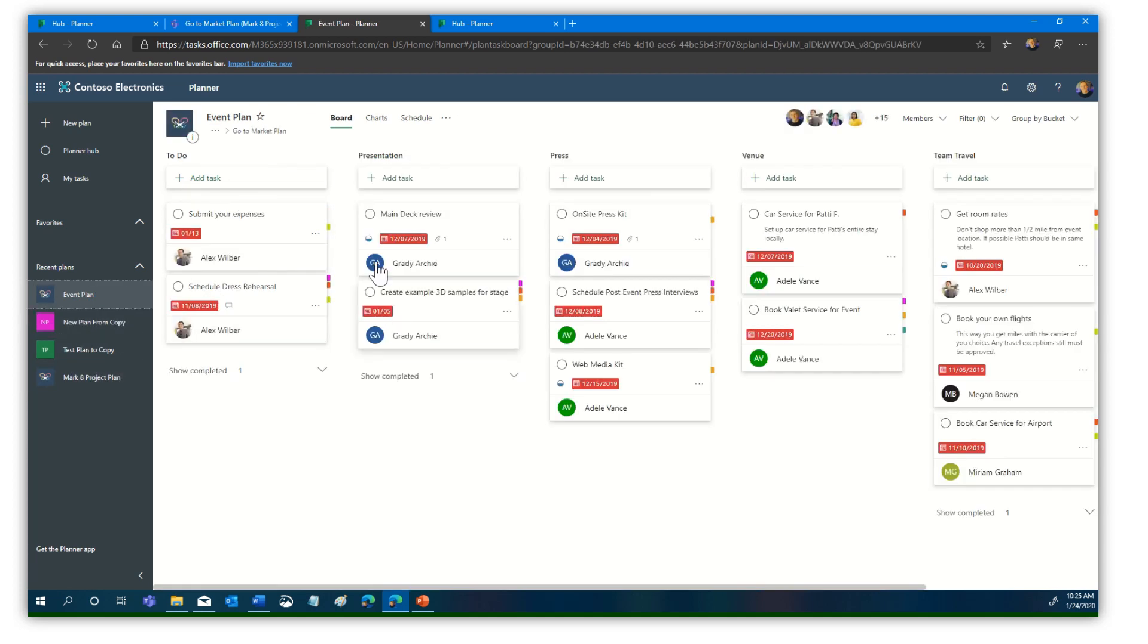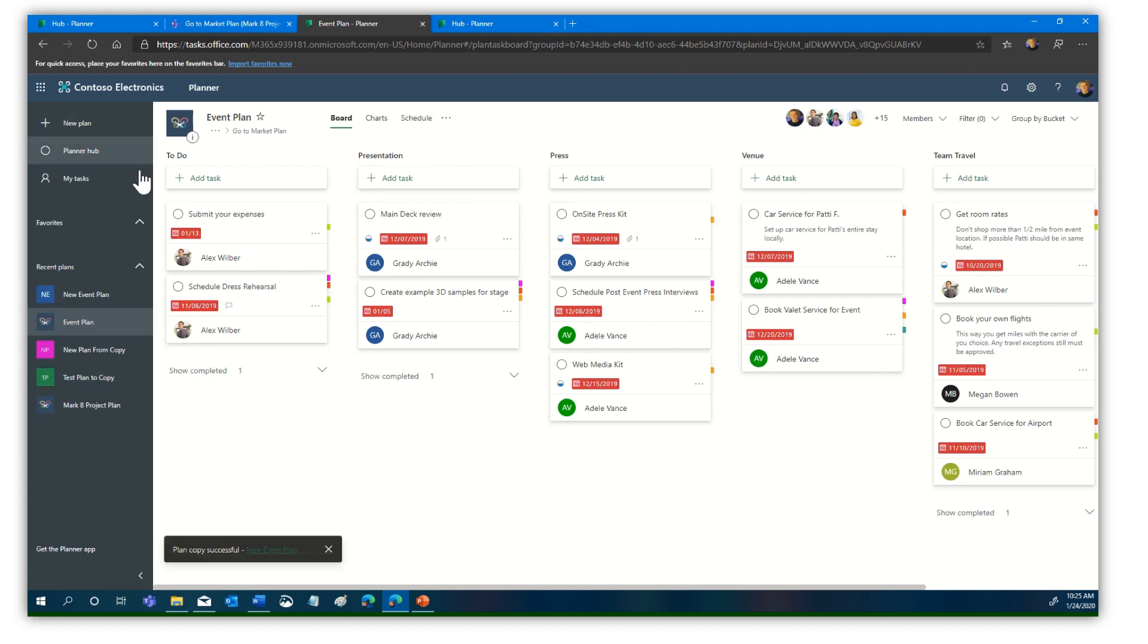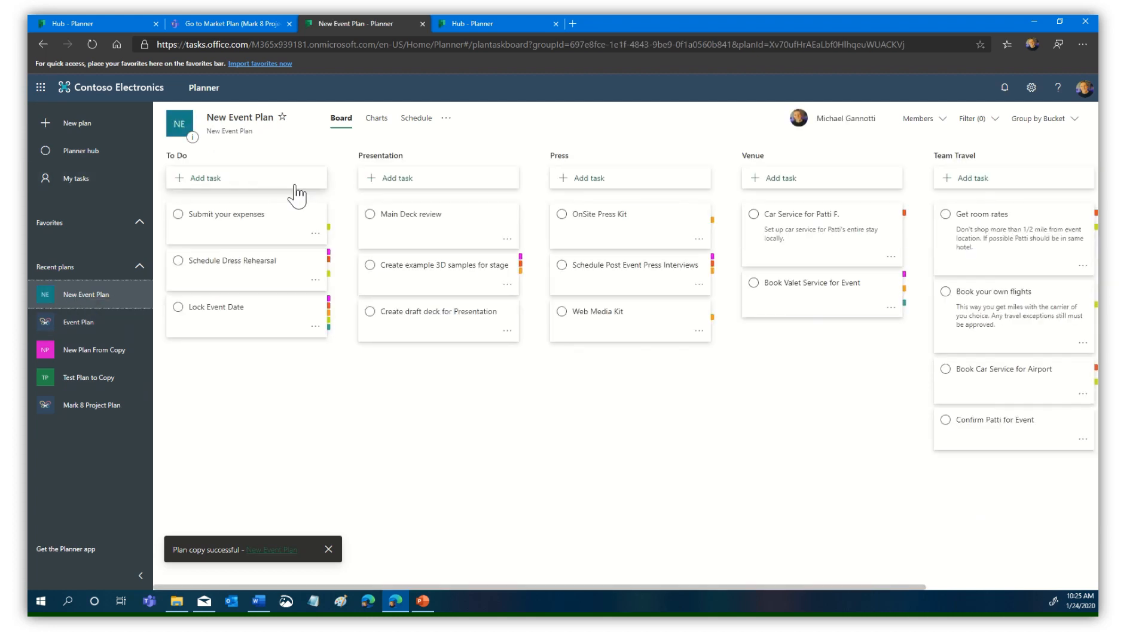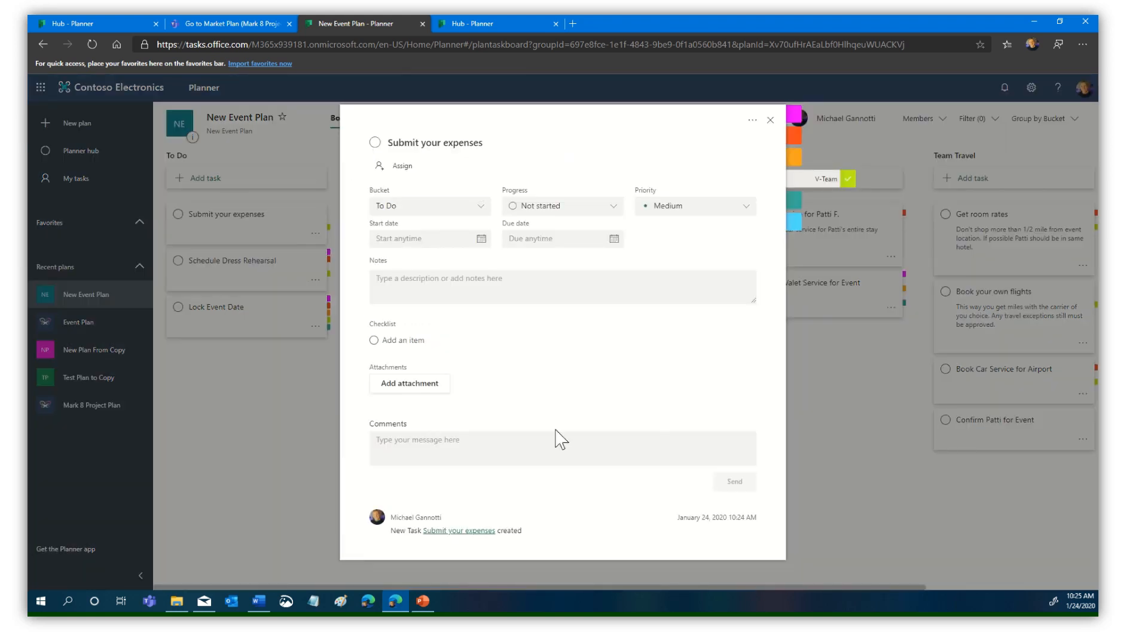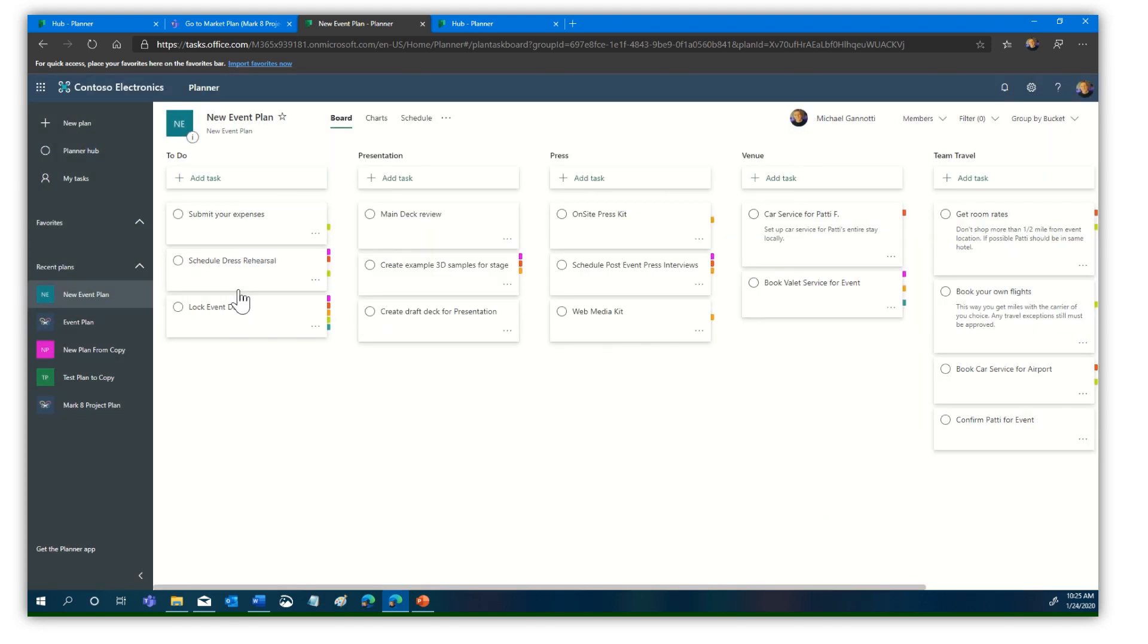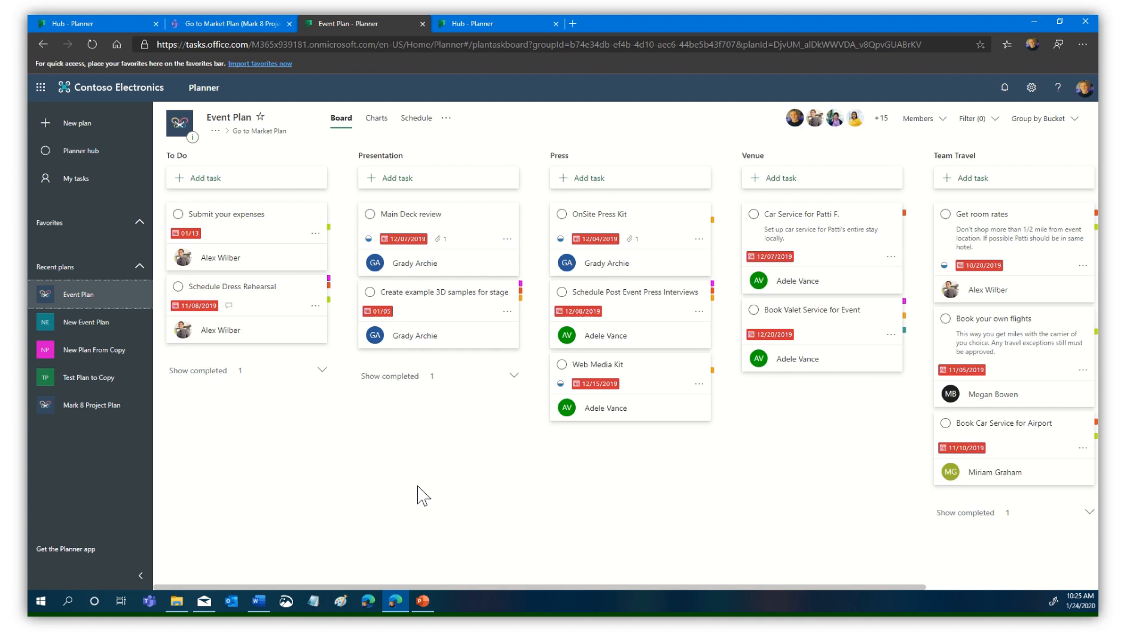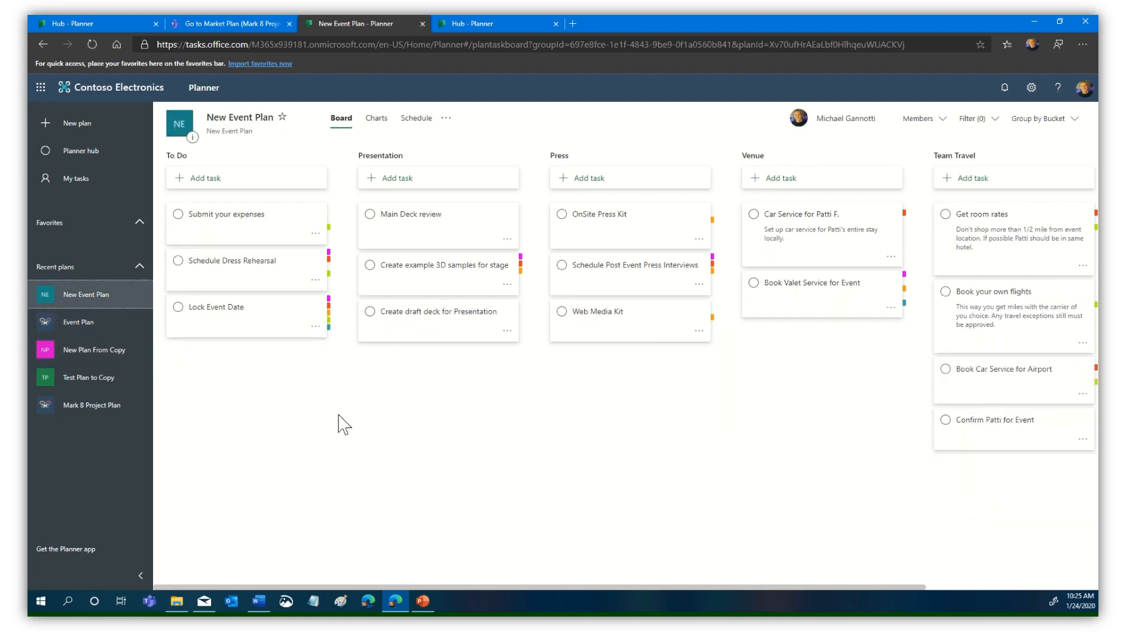We also created one from this event plan. And there it is. Now you can see it has maintained the to-do, the presentation, the venue, team travel. All these pieces have been brought over. The difference is it hasn't added dates yet because we don't know those dates. The submit your expenses is there, but it has not added individuals to those components either. The personalized pieces that would be with that individual plan were not brought. But all the task structure was there. Now we can attribute it to people and times and do all those things that we need to do.